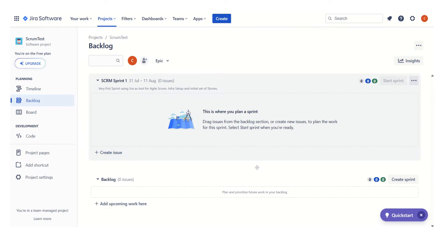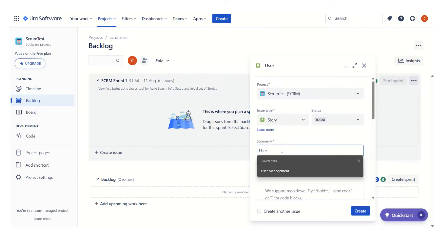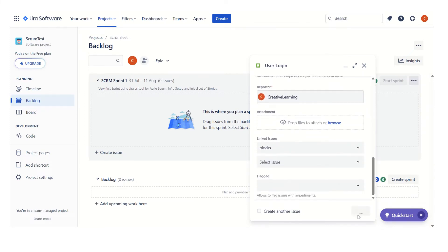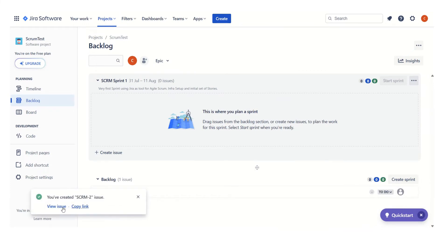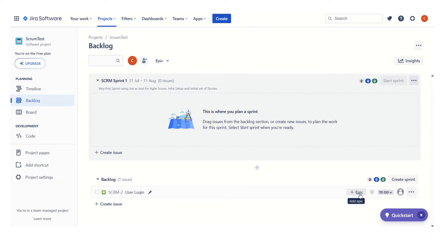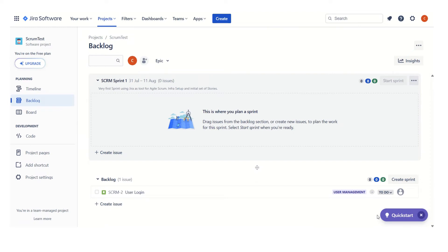Now if we have to create a story as part of that epic, we click 'Create' again and select 'Story'. The very first story is 'User Login'. After clicking 'Create', we can see the user story has been created. Now we have to assign a parent epic to this user story. We can add the epic here — it automatically assigns the epic 'User Management' to the user story. In the backlog we now have one user story tagged with the epic 'User Management'.